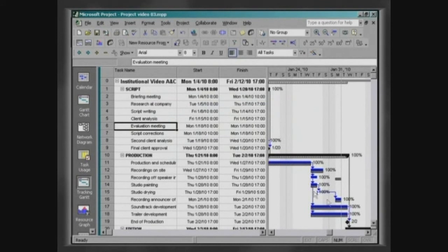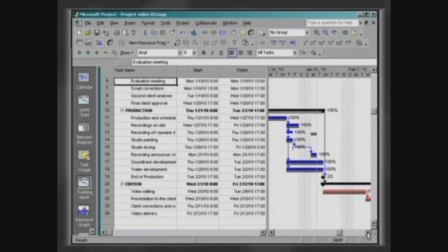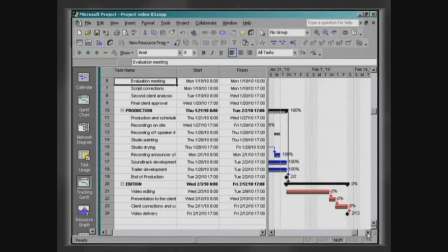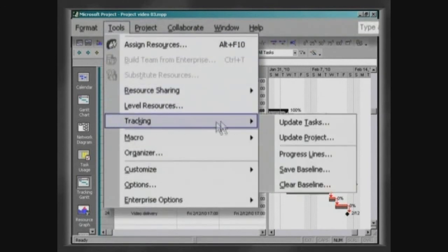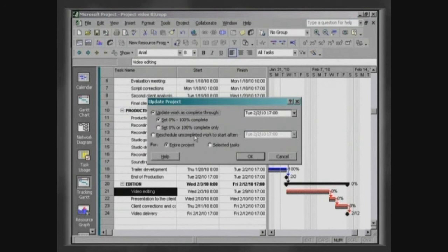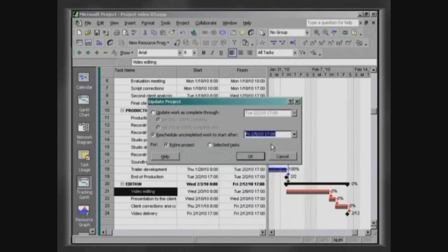Due to technical problems, the video editing task can only start on February the 5th. To determine this date, click on Tools, Tracking, Update Project. Enable the checkbox Reschedule Uncompleted Work to Start After and fill in February the 5th at 8 o'clock.